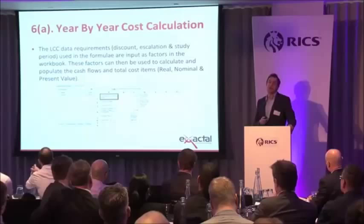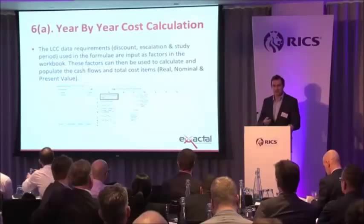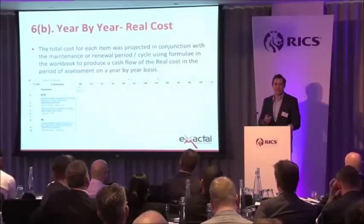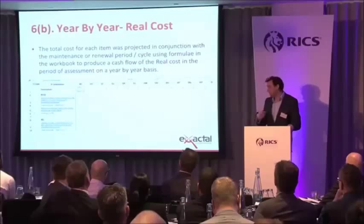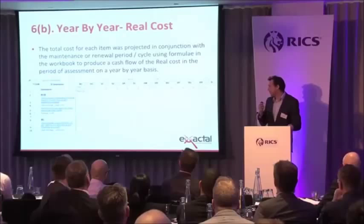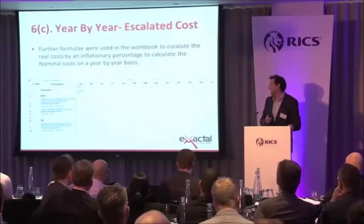So we need to input the inflation rate, the discount rate, the period of the analysis, and whether we want it displayed in real costs, nominal costs, or present value. Once the data requirements go into the workbook — essentially what you would do in Excel — we were able to automatically generate our cash flows and calculate those cash flows in cumulative present value or cumulative real cost. There are formulas embedded in those cells that automatically populate the cash flows and the estimate — in real costs in today's money, in escalated nominal cost, and in present value.